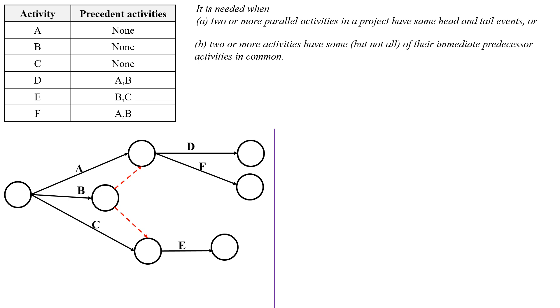According to the rule of network diagram, the network diagram should have only one tail event. So merge the activities D, E, and F at one event like this.